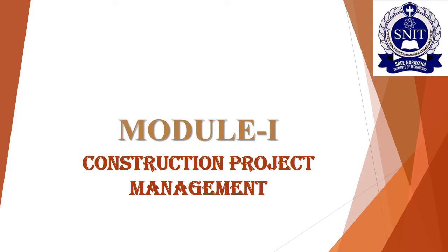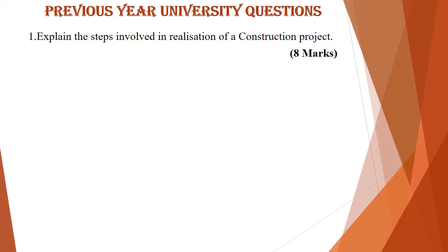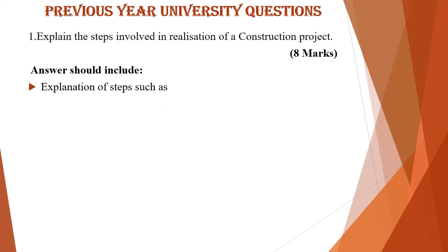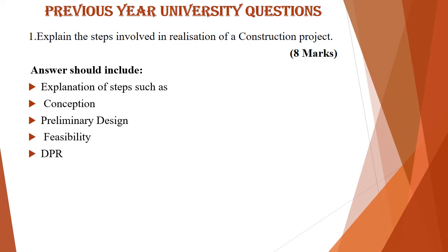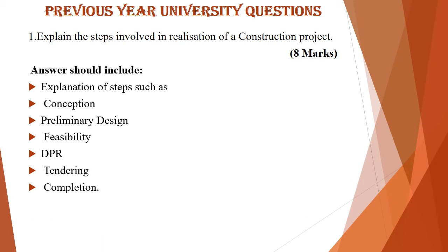Module 1 is Construction Project Management — Introduction to Construction Project Management — and today our topic of discussion is previous year questions from module 1. The first question asked was: explain the steps involved in realization of a construction project, which is asked for 8 marks. The steps involve: first, conception; preliminary design; feasibility; the detailed project report or DPR; tendering; and completion of the work.